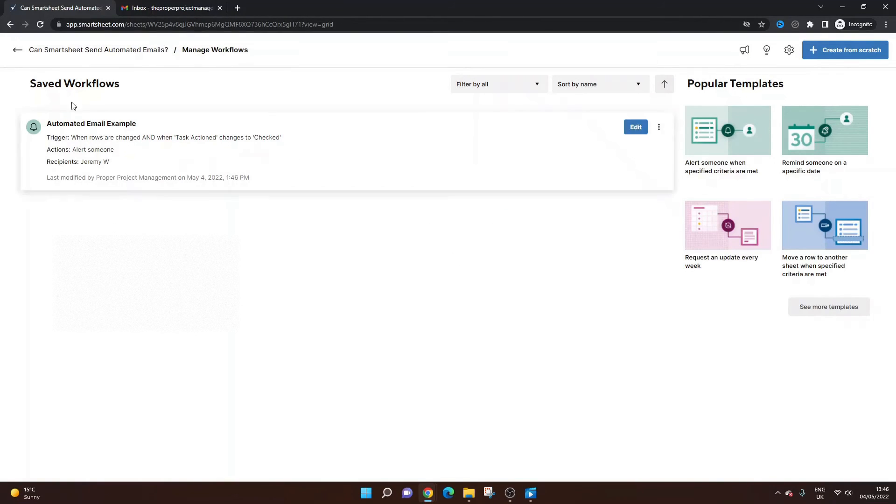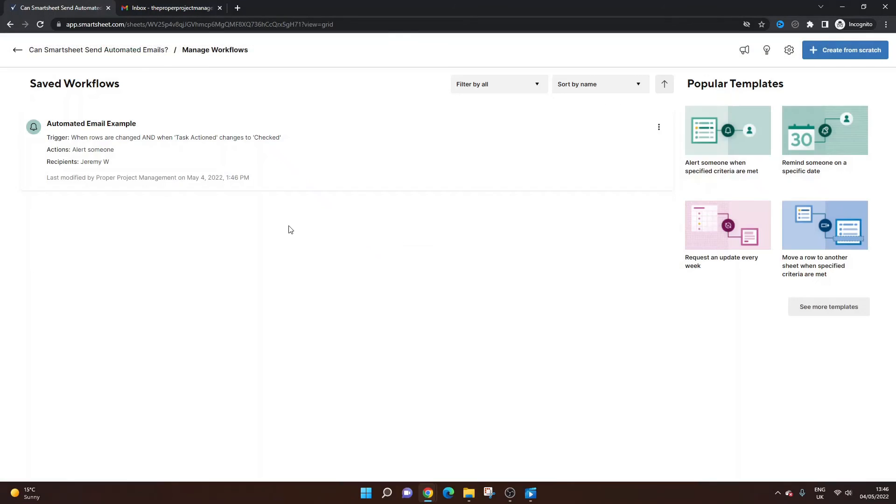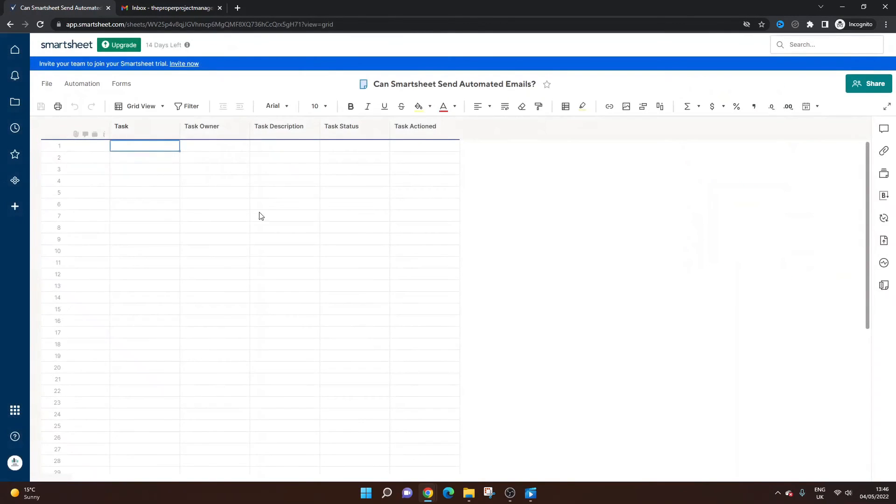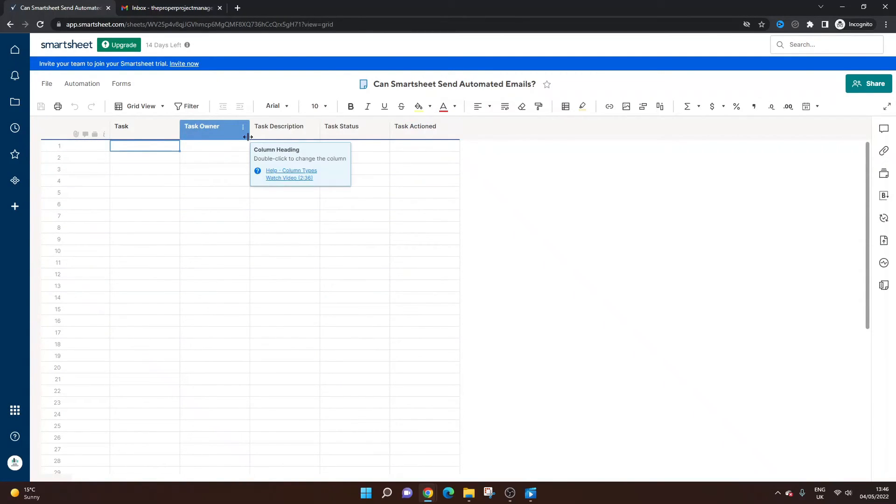So here you can see the workflow. So if I go back and I was to go into here. Manage workflows. It should take us to that screen. So we can see that it's in place. So now I know that the way this is set up, an email reminder or notification will be sent when I check something in this column. So let's just do it as an example.